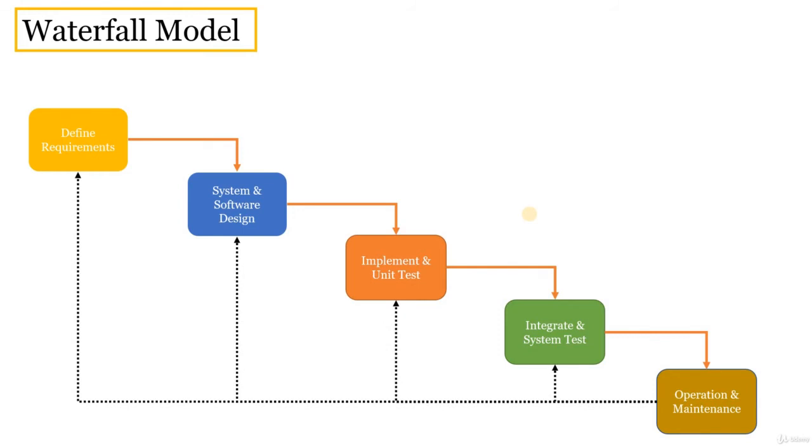So the waterfall model is a sequential approach where each fundamental activity of a process is represented as a separate phase arranged in linear order. Like I have shown here, the process and the activities performed in the waterfall are linear. In the waterfall model, you must plan and schedule all of the activities before starting working on them.